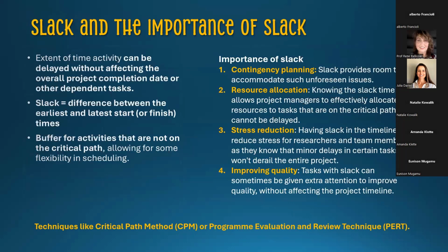So here's another very important aspect that comes into play the moment you've identified risk. And that is almost the opposite of risk, which is slack. Now, risk is identifying those events that are likely or not likely, impactful or not impactful, and then trying to mitigate for them. Slack is the extent of space, of time resource in your system that you have as spare time. So slack in a way is the difference between the quickest finishing time and the latest finishing time.